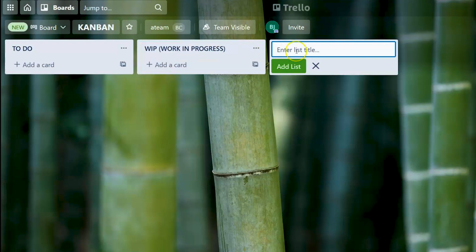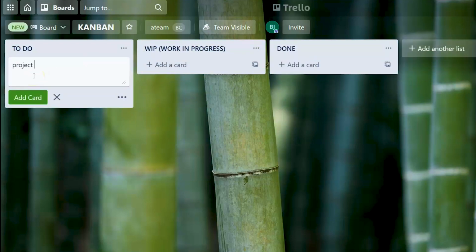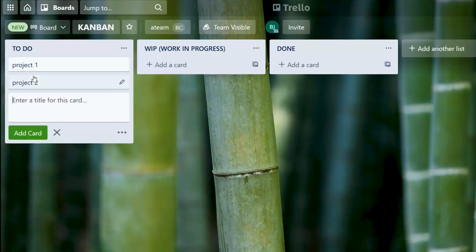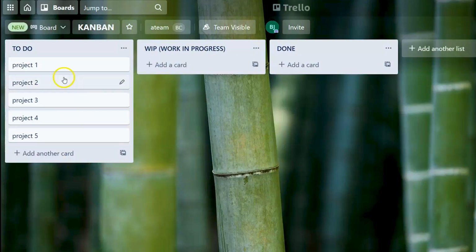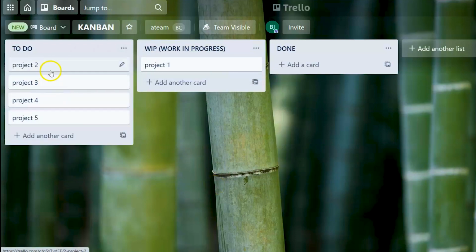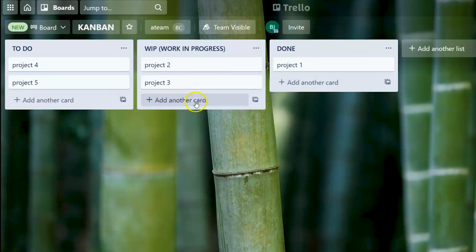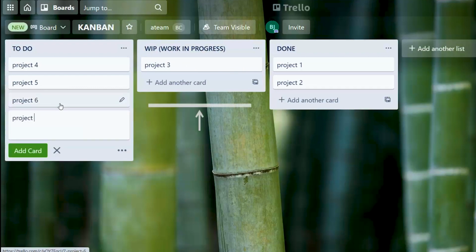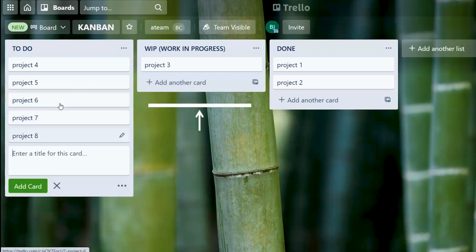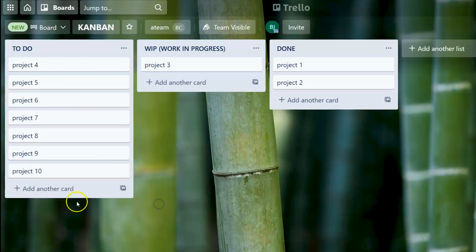The first is for to-do or tasks that you need to do. Second column is for WIP or work in progress. And then third is done or completed. And then as you move your tasks through completion, you're able to see the overall progress or status of all of your work. So the key premise here is to limit the amount of work in progress and maintain a smooth flow of work to basically ensure that you eliminate bottlenecks and backlogs.